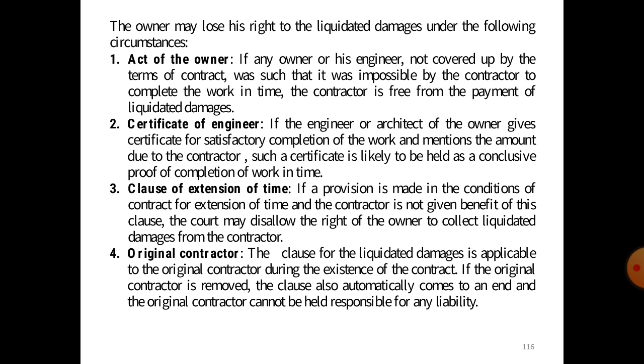Now next topic is that the owner may lose his right to the liquidated damages in some circumstances. Here four circumstances are given. First is the act of the owner. If the owner or his engineer, not covered by the terms of the contract, made it impossible for the contractor to complete the work in time, the contractor is free from the payment of liquidated damages. Second circumstance is a certificate of engineer.